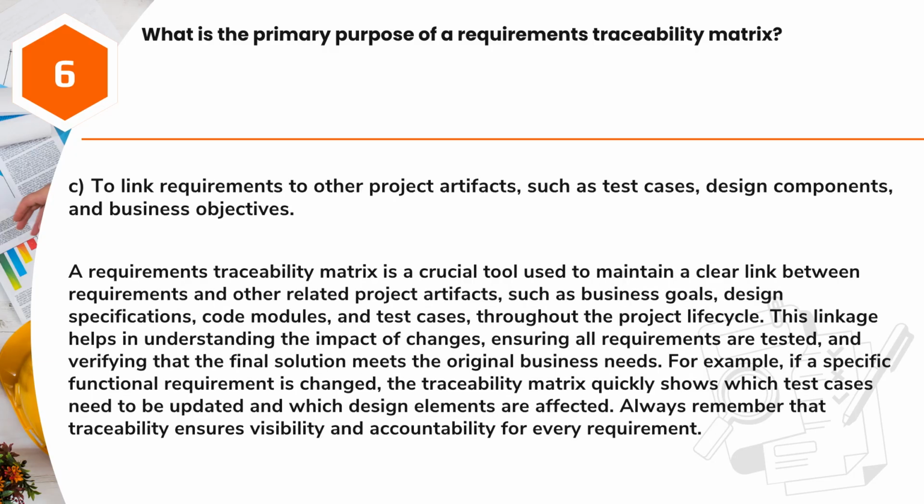Answer: C. To link requirements to other project artifacts, such as test cases, design components, and business objectives. A requirements traceability matrix is a crucial tool used to maintain a clear link between requirements and other related project artifacts, such as business goals, design specifications, code modules, and test cases, throughout the project lifecycle. This linkage helps in understanding the impact of changes, ensuring all requirements are tested, and verifying that the final solution meets the original business needs.